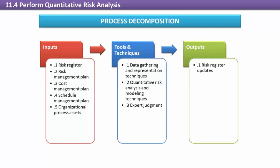Since quantitative analysis is much more time consuming than qualitative, it's normally performed only on high priority risks.